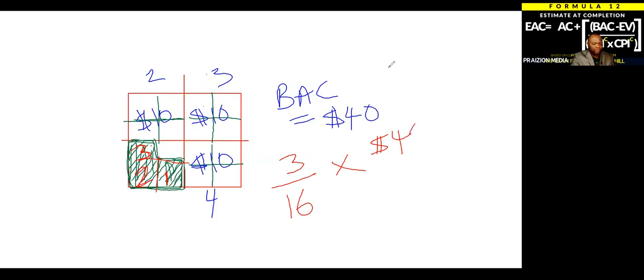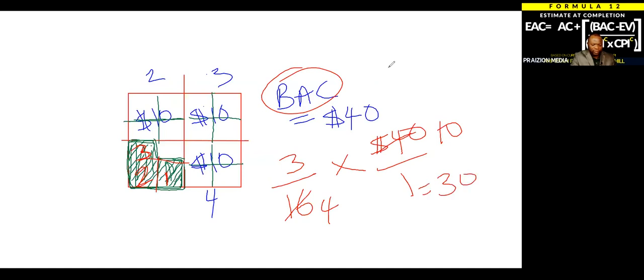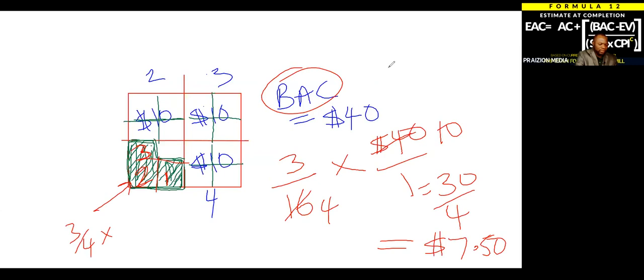So I'm trying to show you, you could do it either way. You could do it using the planned value, or you could do it using the budget at completion, but you have to get good and be in command of what to use and when, okay? So 4 goes here, and 10 goes here, and that is 30 over 4, which is 7.5, the same number, or $7.50, the same number you would get if you did 3 over 4 times the planned value